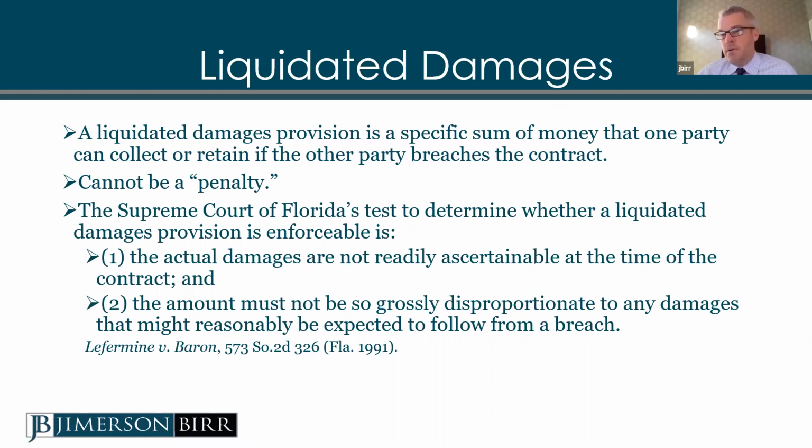I've seen liquidated damages be a couple thousand dollars a day. I've seen them be really high. It just depends on the type of project that you're dealing with. So you just have to try to do the best you can if you're the owner in that situation, and estimate what your damages are going to be if it's not delivered timely. So you'd want to memorialize that, make notes of that: how did you arrive at that figure, if you ever have to defend it?